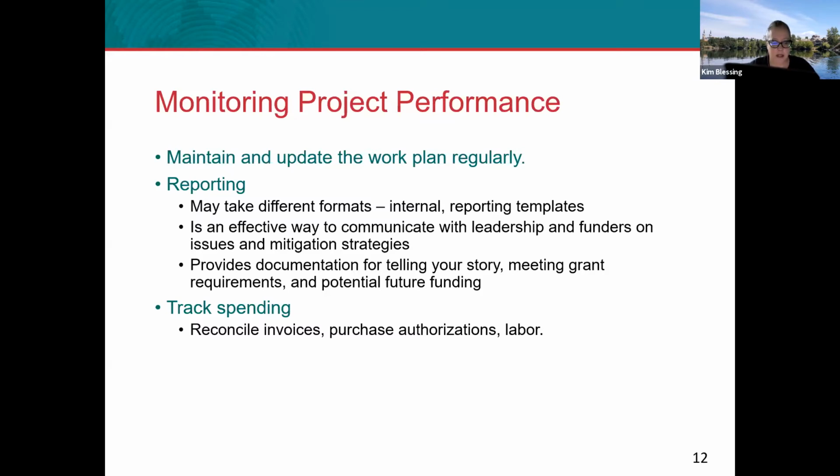So again, you know, creating a process for those purchase authorizations so that you as the project manager are the one that is authorizing the spend on your contract. And that's really how you can stay in control of your spend and you don't have staff ordering services or purchasing things without your authorization. And then you also want to track labor. So whoever's billing to your project, how many hours, and if you can set up a system for projecting that out into the future, that really helps so that you can anticipate costs as they come in.